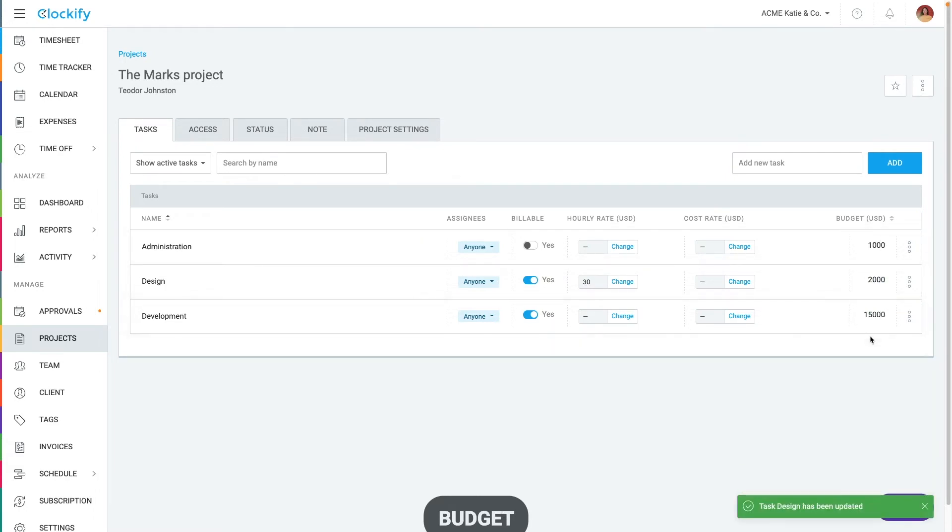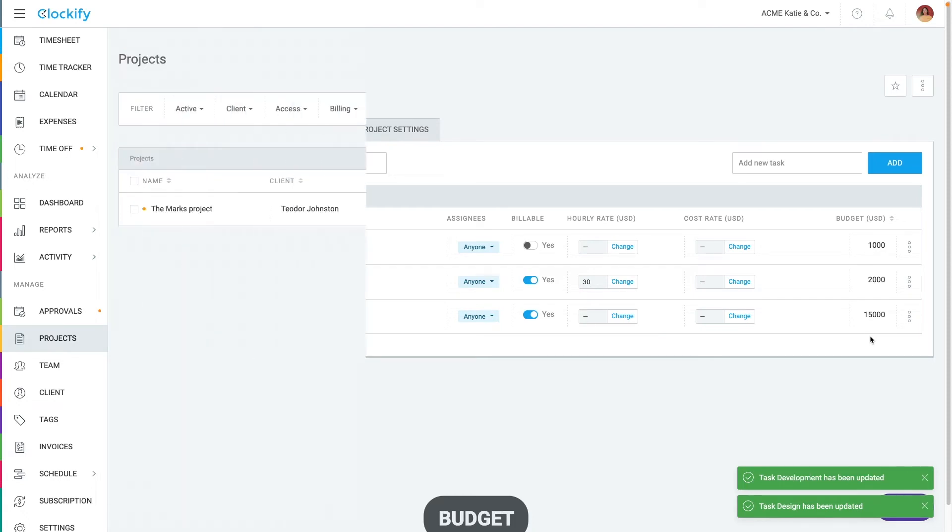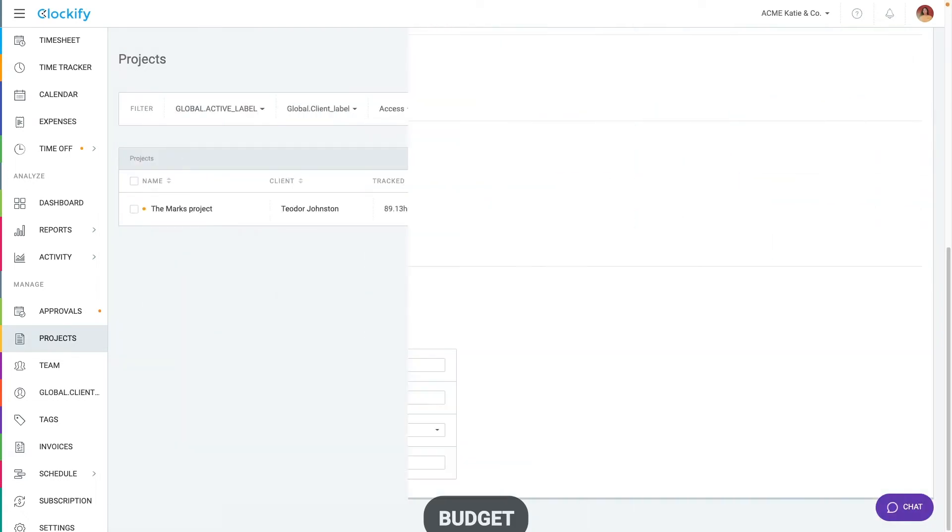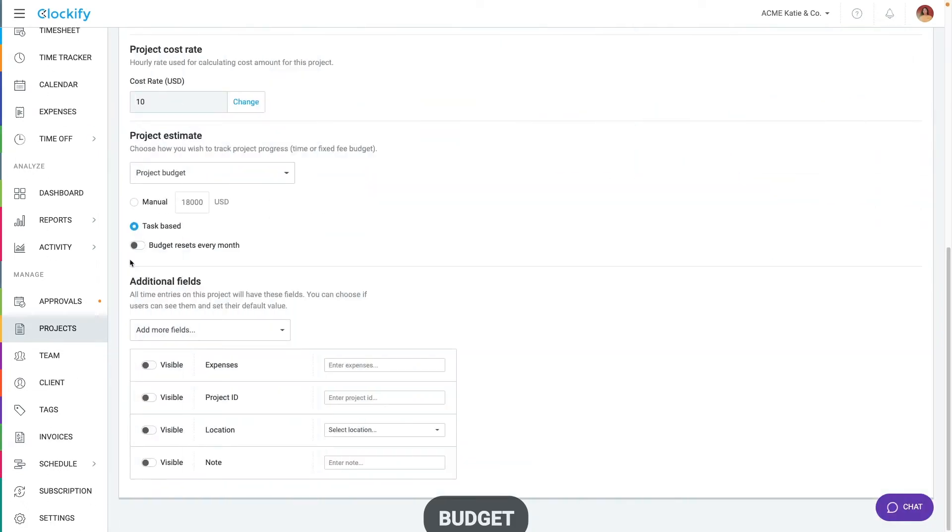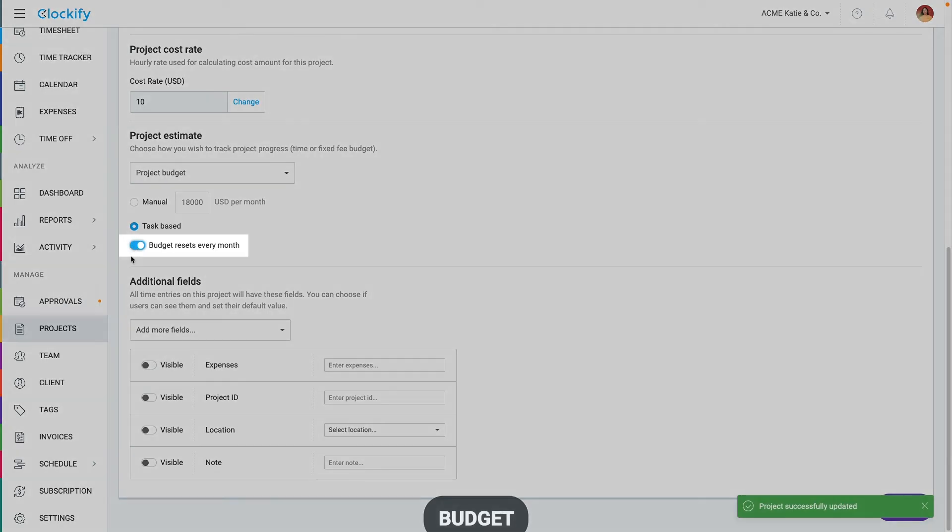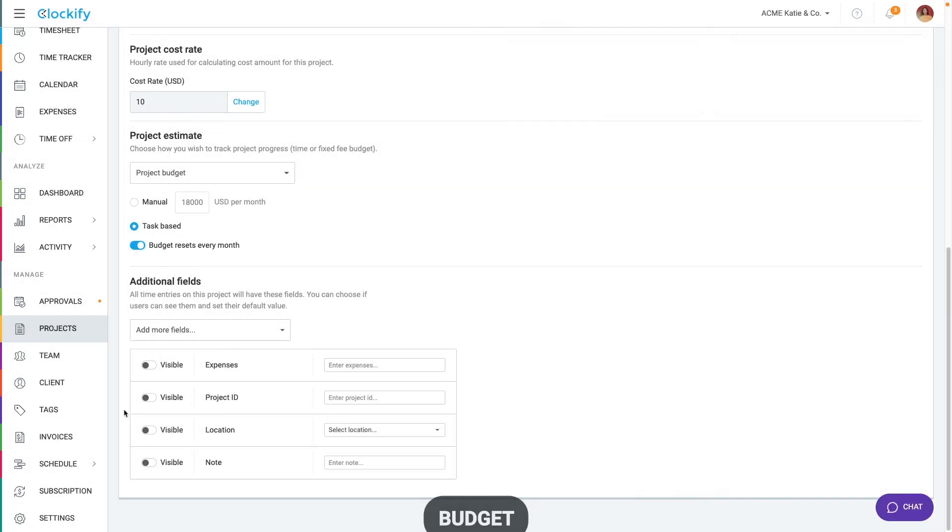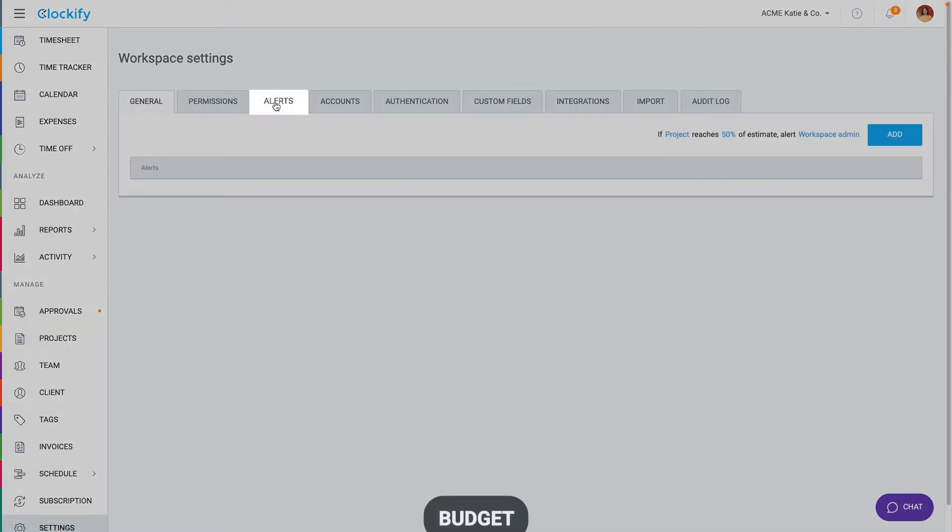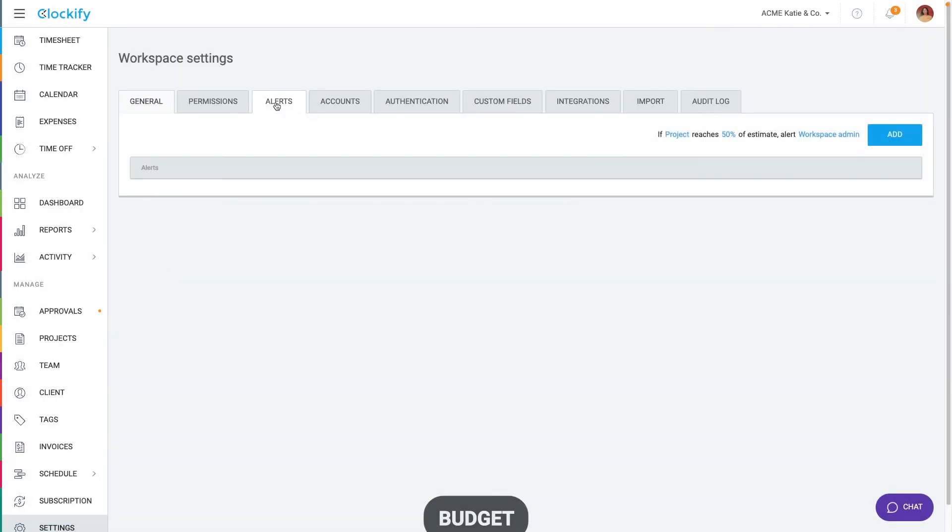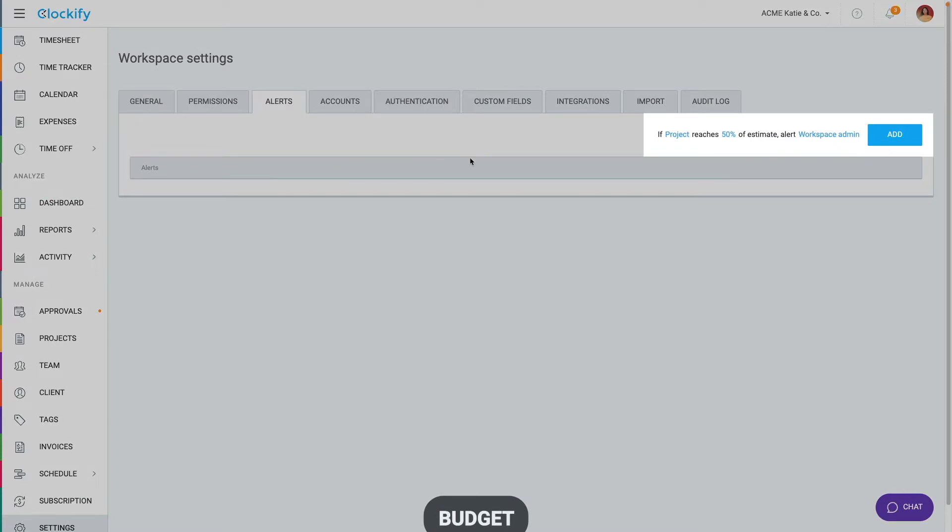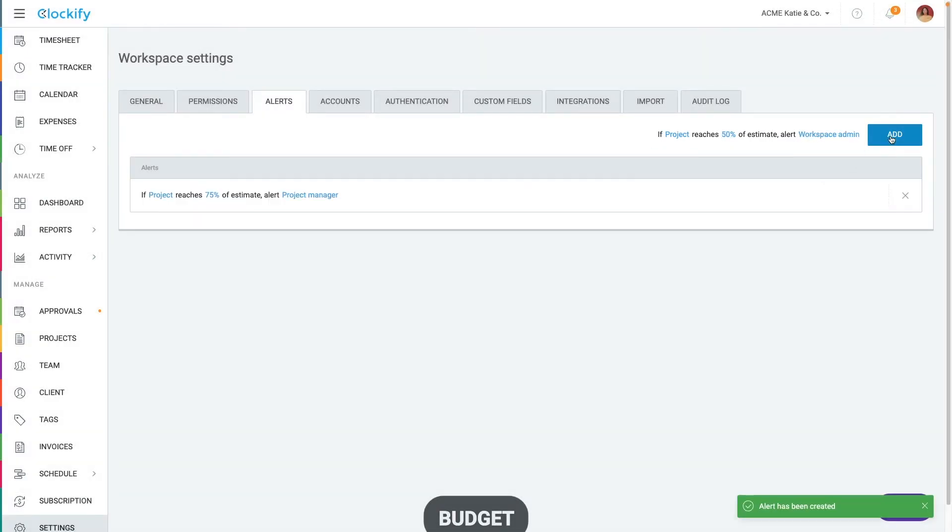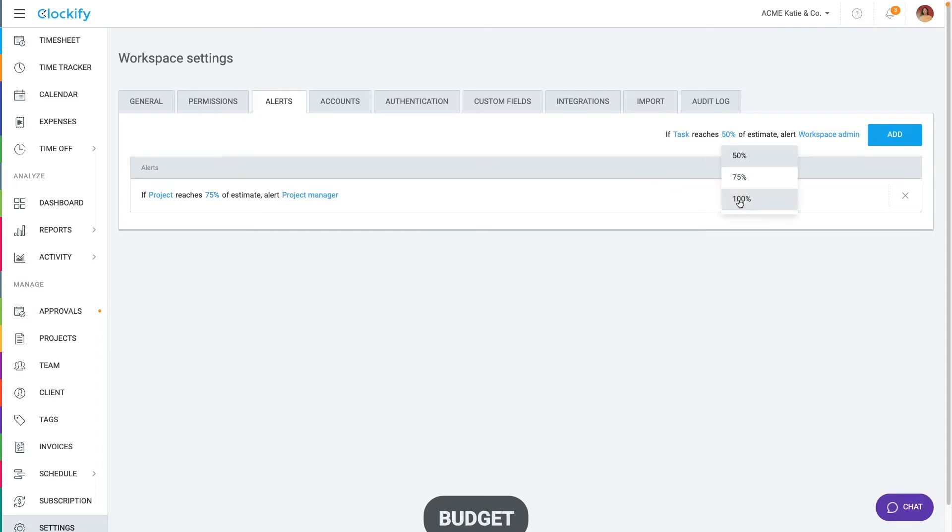Then as you track time, the progress bar gets filled. The progress can also reset each month if you've enabled it in the project settings. To get notified when projects approach their budget, go to alerts page in the workspace settings. Here you can set up automatic alerts like when a project reaches 75% of its budget, send an email to project manager. You can set another alert like when a task estimate reaches 100% to notify task assignees.